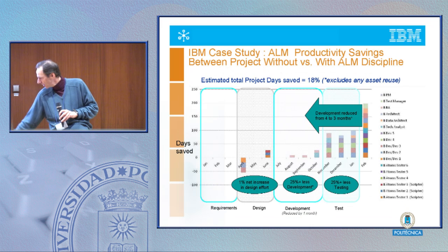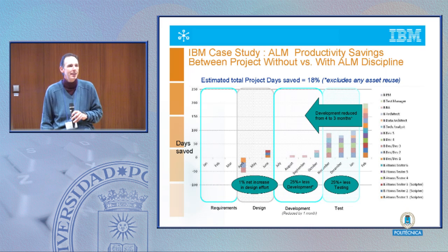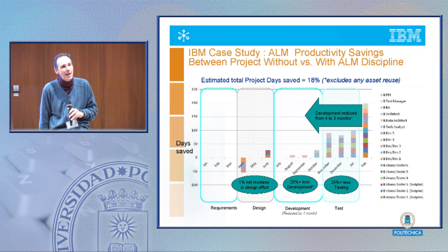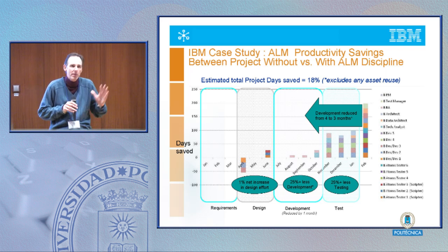And in fact, we can look at the analysis of what we do. A couple of interesting observations. One is, you may actually have to spend more time at the front than you expected. And to many people, this is obvious. If you're going to outsource a project, if you're going to be more iterative, more flexible and agile, if you're going to make decisions more quickly, you'd better make some decisions up front about architecture that are going to stick, because you can't have everything changing all the time.